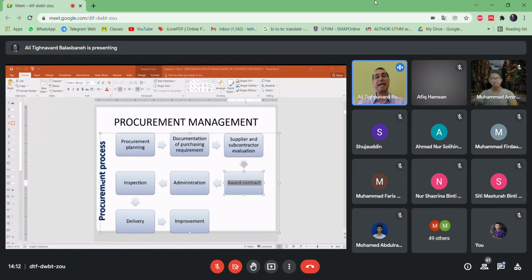But in any case where you don't have full information and you don't know all the suppliers, yes, you can make an open tender and invite everybody, like 100. 100 is just an example, maybe 200, maybe less, maybe more. You invite everybody, but you are not always going to choose the lowest price they offer, but the price should be realistic.